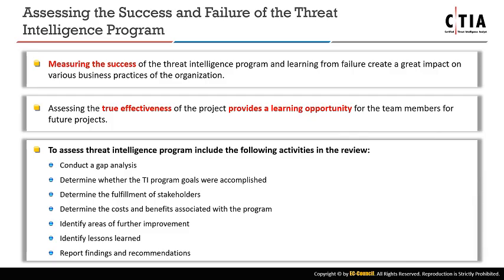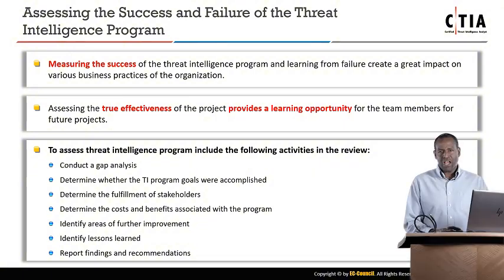And then we look at lessons learned. So what do we learn about the implementation of the TI project? We take those lessons learned and we want to make sure to document them. What we don't want is just a meeting where people sit around and talk about this information. We want it all documented so that it can be beneficial to anybody in the future.